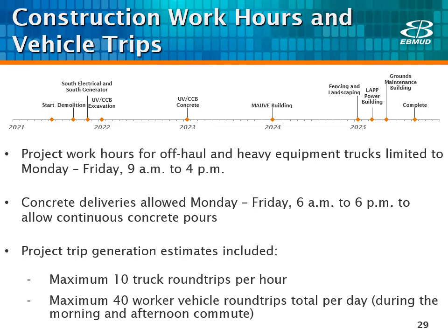It is estimated that the heaviest construction traffic would occur during years 2022 and 2023 for the excavation and concrete pours for the UV structure and CCB. The total excavation and concrete pour durations include periods of time where there is no significant construction activity at the site. For example, when concrete is curing, or we're doing startup facilities testing. It also includes winter time periods when the Orinda water treatment plant will be taken offline to connect the project components to the existing treatment infrastructure.